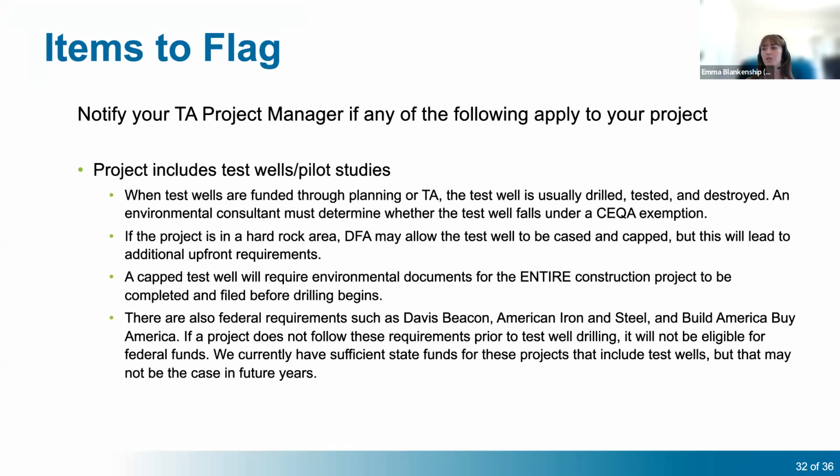The only exception to this process is if the project is in a hard rock area, then we may allow the test well to be cased and capped and then converted to a production well later on under the construction project. But this will lead to some additional upfront requirements. So a capped test well is going to require environmental documents for the entire construction project. And those must be completed and filed before the test well drilling begins.